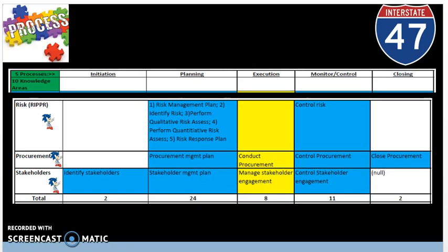part of stakeholder analysis. The 44th process of identify stakeholders is the process of identifying people, groups, or organizations that could impact or be impacted by a decision, activity, or project outcome, and analyzing and documenting relevant information regarding their interests, involvement, interdependencies, influence, and impact on project success. Keep in mind that stakeholders come in various forms. As a project manager and even your own team members are stakeholders because they're actively involved in the project.